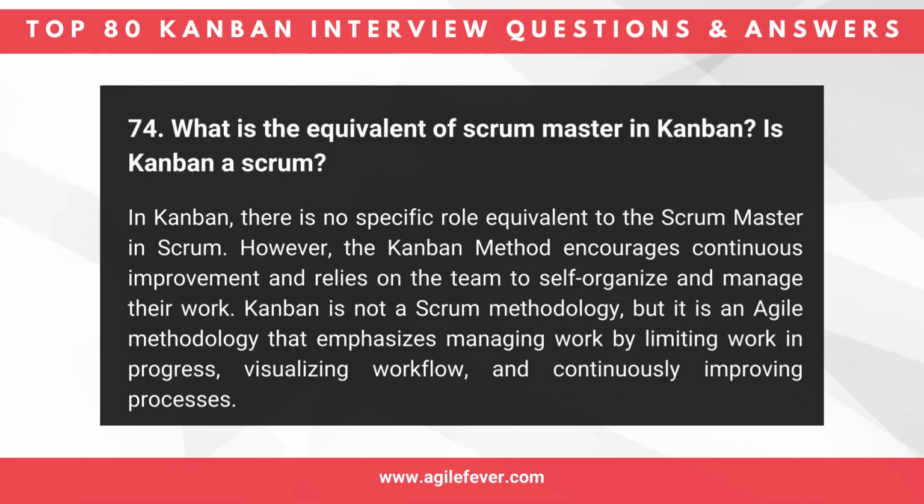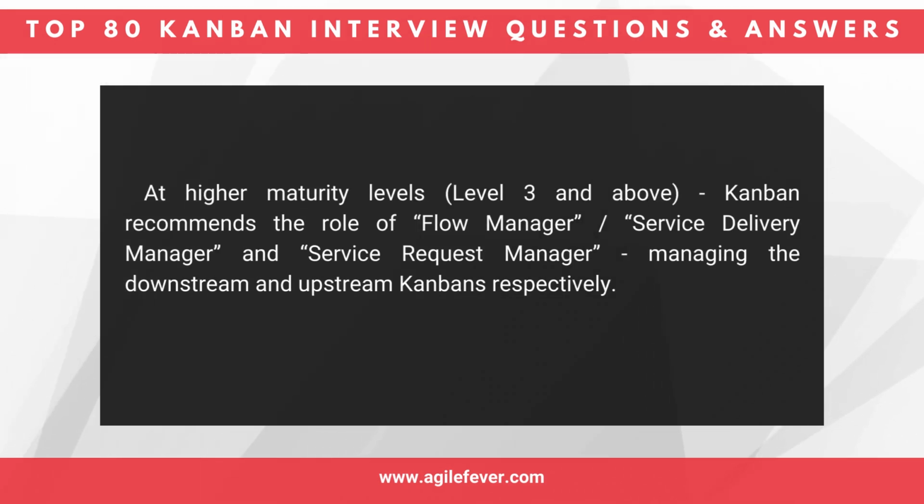Question 74. What is the equivalent of Scrum Master in Kanban? Is Kanban a Scrum? In Kanban, there is no specific role equivalent to the Scrum Master in Scrum. However, the Kanban method encourages continuous improvement and relies on the team to self-organize and manage their work. Kanban is not a Scrum methodology, but it is an Agile methodology that emphasizes managing work by limiting work in progress, visualizing workflow, and continuously improving processes. At higher maturity levels, level 3 and above, Kanban recommends the role of Flow Manager, Service Delivery Manager, and Service Request Manager, managing the downstream and upstream Kanbans respectively.